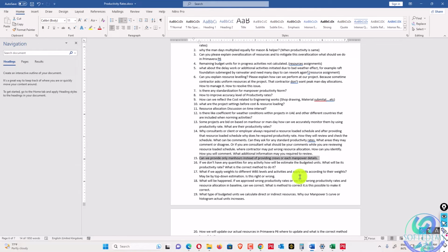Maybe there is an activity which has a higher material cost and lower labor cost. Maybe one activity has 10% labor cost and another activity has 30% labor cost. So there may be different ratios of unit labor and cost, and you cannot apply cost weights to your labor. Maybe in procurement there is no labor applied, and in engineering there is not too much manpower applied, but there are higher cost percentages, so you cannot deploy manpower there. So it is not dependent on the weights.